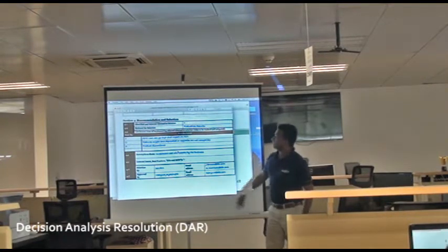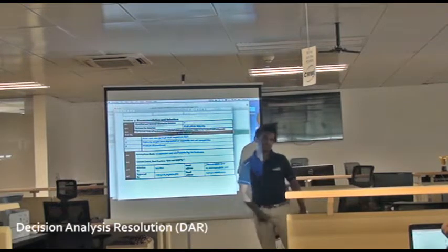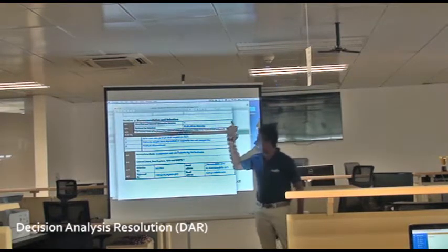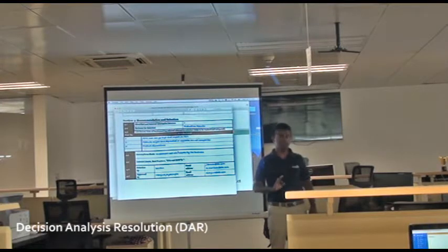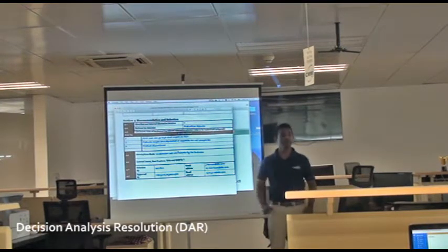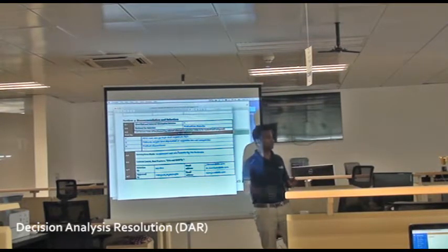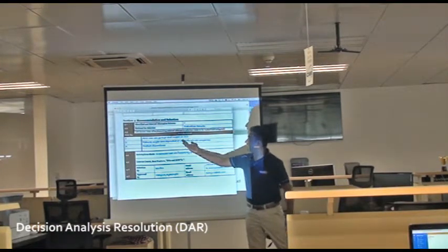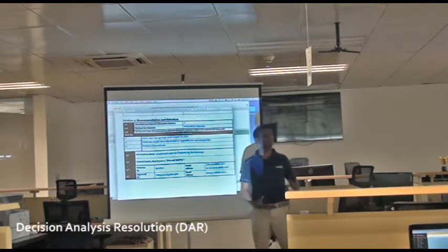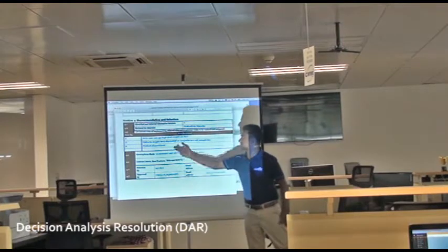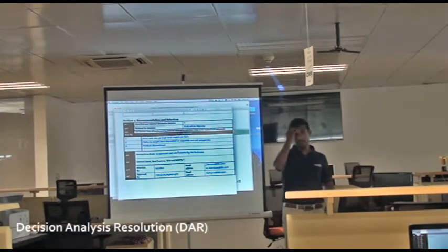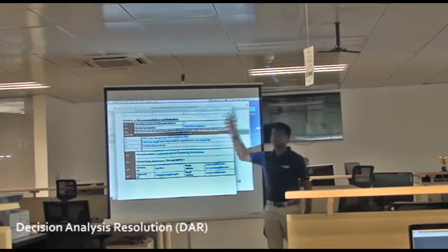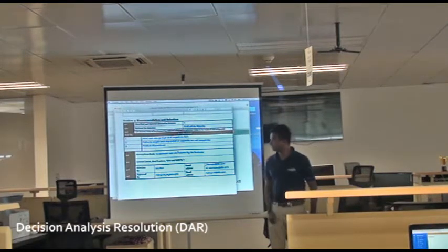All right. Then you need to list the risks. Okay. While evaluating the alternative solution, you need to highlight those risks, which is compulsory. All right, and then risks to be tracked and mitigated. So that will be taken care of by the risk management process. So what are the risks I have? AMC cost can go high and impact ROI. So you need to figure out how you handle it. Then product discontinuation: if you select a commercial product, what if the commercial provider discontinues the product? So you need to highlight it from the risk side. You need to address it and mitigate.